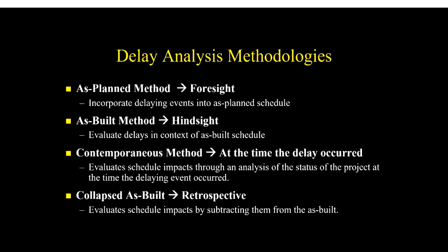This technique requires, of course, that as we perform the updates on the project schedule, month by month, week by week, when we end with the project, we will have an as-built critical path. Without it, we will have to recreate it. And of course, it is quite difficult to recreate history if that history was not recorded contemporaneously. But it is possible, indeed, to recreate a critical path after the fact.